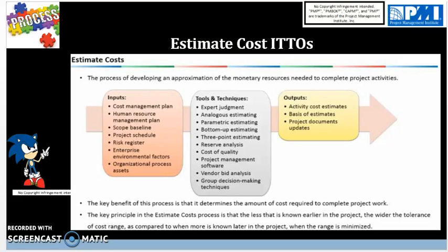And it uses the pessimistic, optimistic, and most likely estimates. Next, we have reserve analysis for tools, where we analyze the contingency reserves, which is money set aside for known accepted risks as part of the cost baseline, and management reserves, which is money set aside for unknown risks or unknown unknowns outside of the cost baseline.